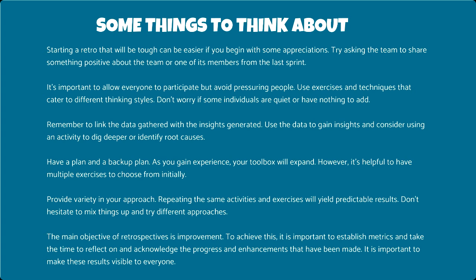So an example is, every now and again, I like to use timelines as a way to just understand what's happening for a team, and get a timeline as a way to get data all into the room. And that's a great way to understand all the things that might have happened in a 2-week iteration or a month iteration or whatever it is, and start really using those things to notice patterns, and then start looking for ways to improve that, right?